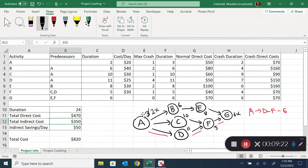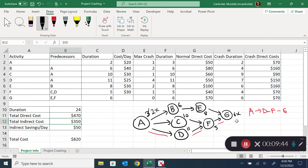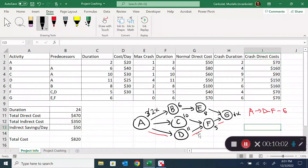Since A was common to all paths, reducing A did not change the critical path. An important point here is that you cannot crash multiple days at a time because another path might become critical. The critical path is still A-D-F-G. Looking at options to go from 24 to 23 days, the only two candidates are D at 25 dollars per day and F at 30 dollars per day. I choose D as the cheaper option, shortening it from 11 to 10.